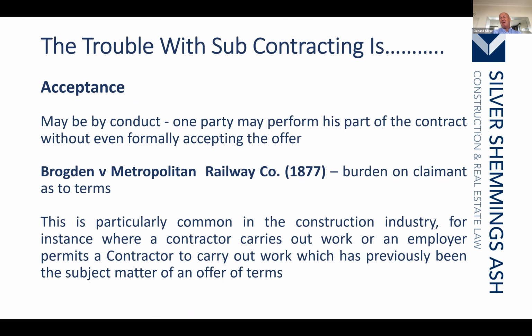An example of that might be where the subcontractor starts issuing letters referring to certain provisions within the contract. So you may have the strange situation that the subcontract order is issued after the subcontractor started on site and hence is not applicable. But then by the subcontractor referring to clauses within the contract, they have by their conduct accepted.